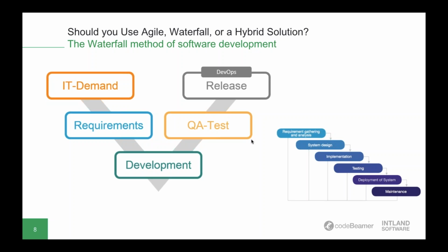Now, that said, even with the more modern agile approach around, Waterfall is still the go-to methodology for the development of complex multi-tier hardware and software architectures. So think about airplanes, certain safety critical products, all sorts of industrial equipment. Waterfall is used there. It is a suitable methodology in development projects where requirements aren't expected to change too much over the course of development.